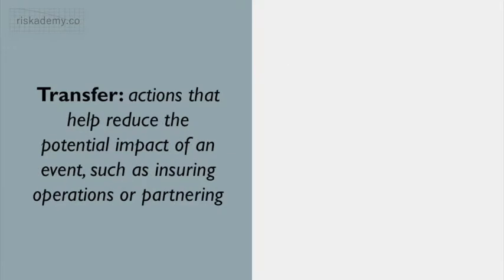Transferring or sharing risks is another common strategy, either through insurance, by outsourcing activities, or partnering with another organisation. Each of these options offsets an organisation's share of the risk, but these benefits come with additional challenges. Outsourcing and partnering require careful consideration to ensure new risks are not being created. For example, what precautions do you have in place to ensure that a subcontractor is not breaking the law? Do you have quality control in place to ensure they're not using substandard materials?